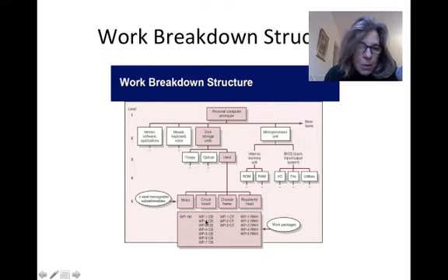But in order to make the circuit boards, there's actually 7 different work packages. Somebody is going to have to make 7 different circuit boards. And this is the way you put together a work breakdown structure. Then once you get that, you start assigning those work packages to people, and then people can start working.